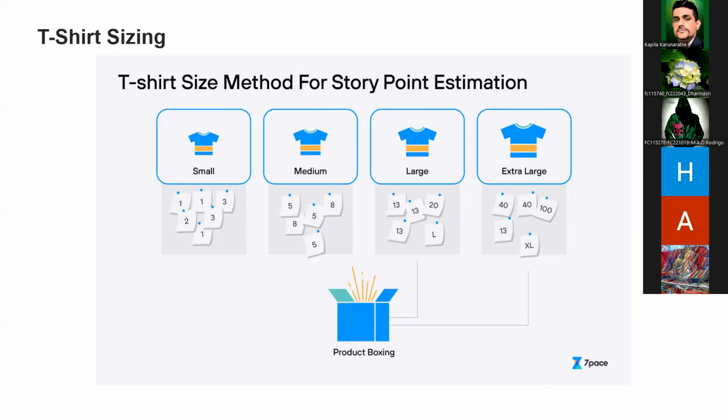Think if you come across something where the estimation is 7, you will take the medium bucket. If something's estimation is 80, you will take the large bucket. If you get something 50, then we will say extra large. If you get something 120, we will go double XL, or something like that. So we will have a t-shirt sizing story estimation. This is another concept we can use, t-shirt sizing.